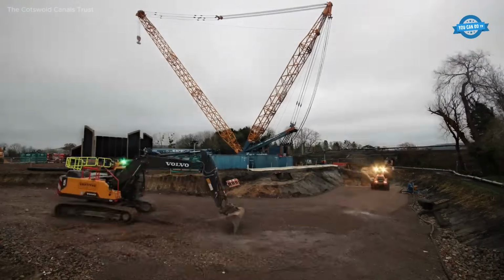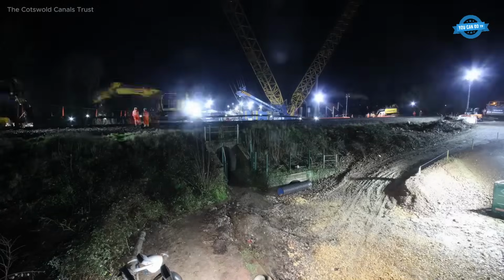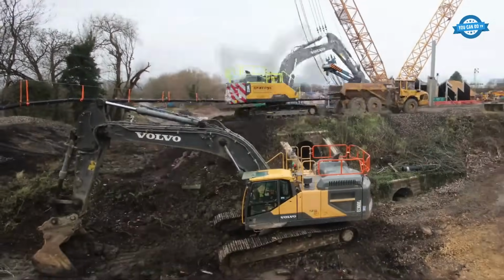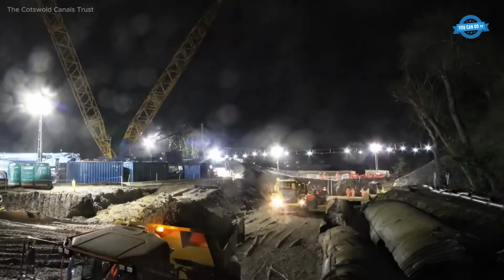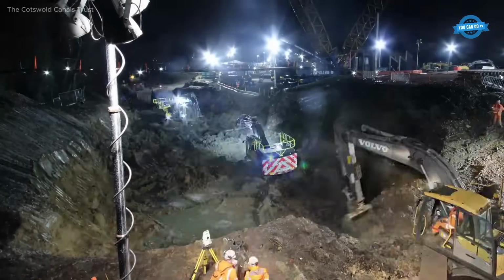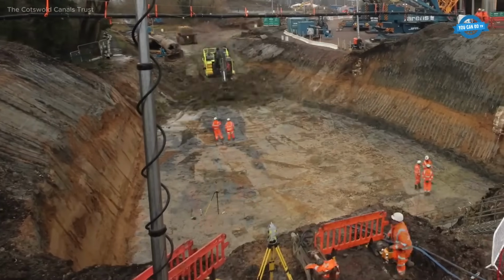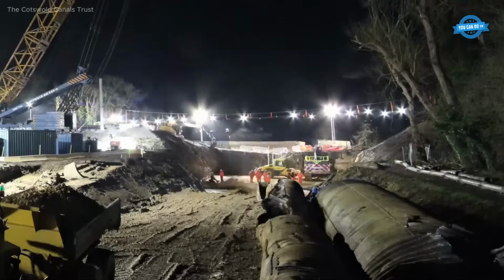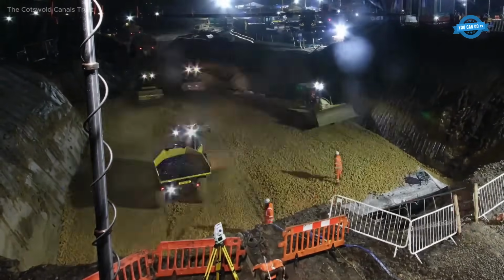The construction of the new Ocean Railway Bridge was executed through a carefully coordinated series of engineering operations within a strict 7-day rail closure window. The process began with site preparation, including rail isolation, traffic control, and environmental safeguards. The existing embankment and undersized culvert bridge were then removed using excavators and sheet piling equipment. Next, deep foundations were constructed by driving reinforced concrete piles into the ground, followed by casting pile caps and abutments on site.